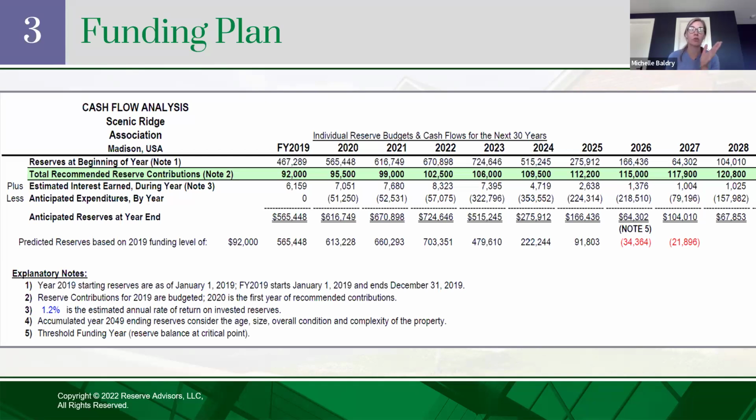Some providers will provide multiple funding methodologies. They should include the cash flow, so that's something to keep in mind and make sure you look for. It essentially treats reserves like one big pot of money. So as your needs change and timing moves, you have that flexibility because it's all put in one place, as opposed to tying up these funds and locking them into all these different components. It's not a best practice to have a balcony reserve, a roof reserve, maybe a pavement reserve, right? You want one big reserve account that you can pull from when you need to.